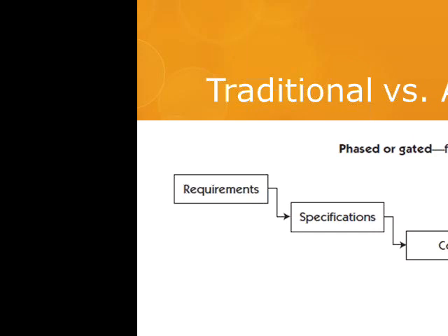So this work which I have not done in the one sprint will move over to another sprint. For sprint 2, the work coming from sprint 1 is the work backlog, especially for me. So I will always complete my backlog first, then I will move over to the new task whenever I'm moving to the new sprint.